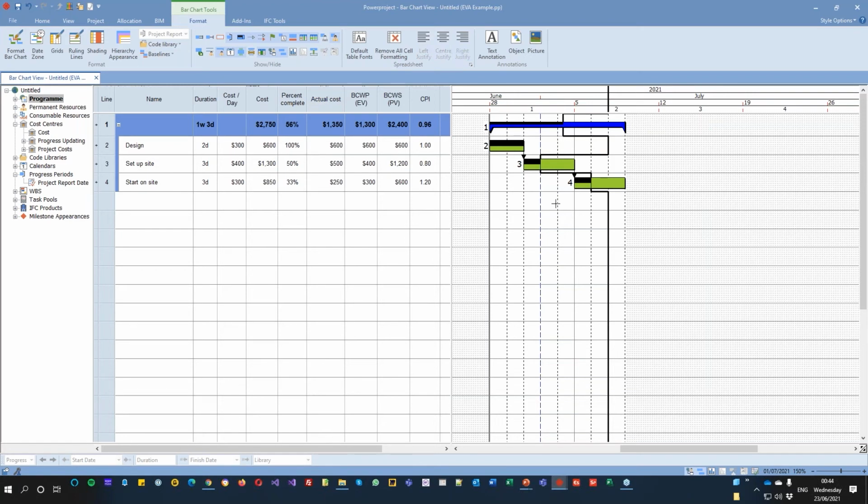And for example, if I had an activity in my project that was representing one of the walls inside the building, I would have to get the actual cost from my costing side of the business of how much that wall actually cost to put in. And a lot of times they don't necessarily estimate it per wall, they may estimate it in a different way, or they don't give the information at the same level that you have your tasks. So it does become a challenge to enter all this information.